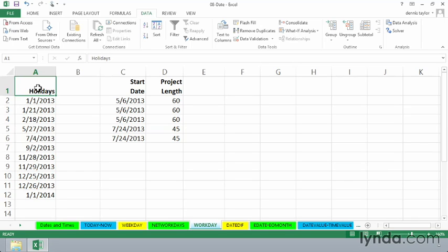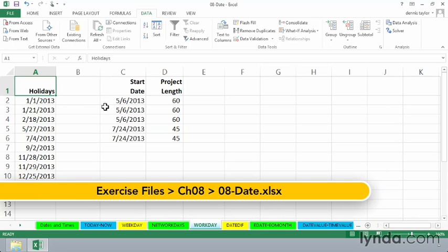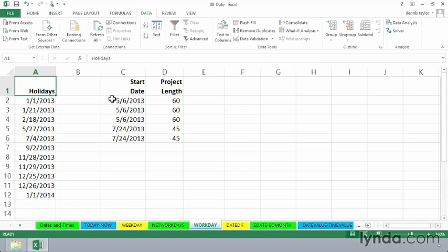When you're trying to calculate a final date, perhaps working with projects, you need to use a function called WORKDAY if you want to be able to account for weekends and possibly holidays. And like its companion NETWORKDAYS, we also have the capability here of adjusting this to different cultures in the world where the weekends might not be Saturdays and Sundays. They could be Fridays and Saturdays and some other combinations as well.